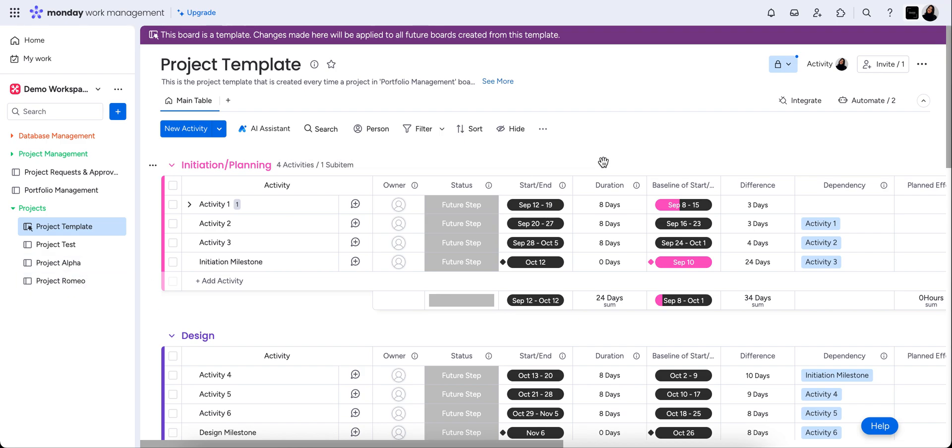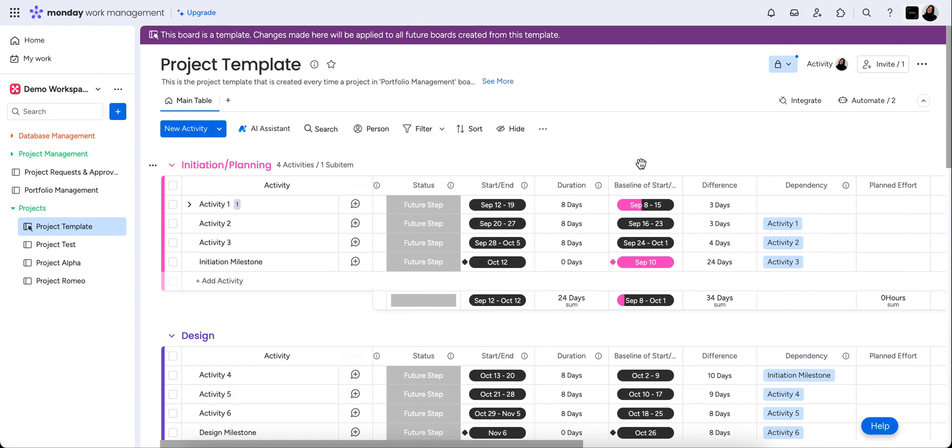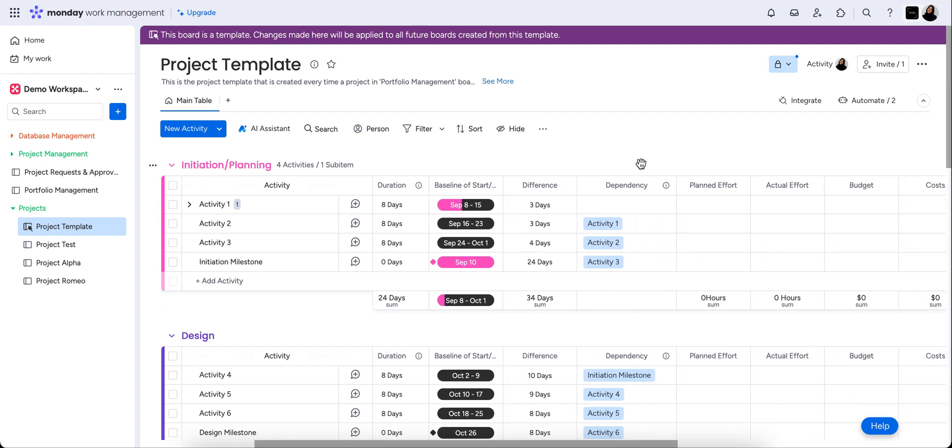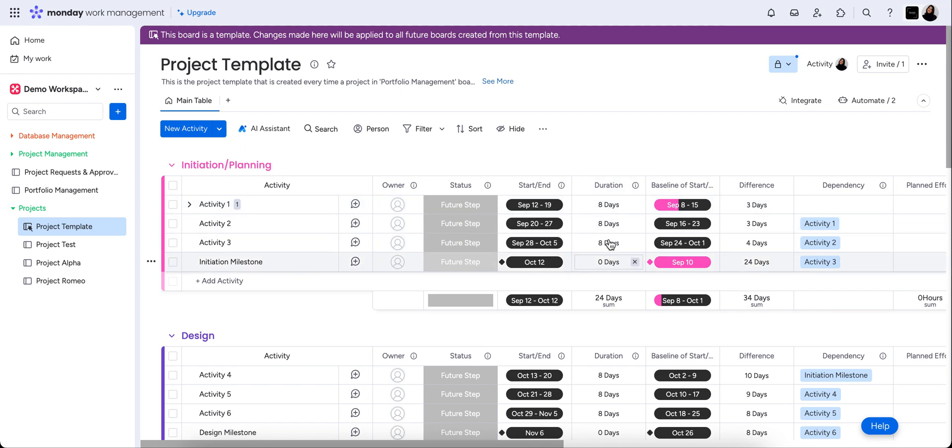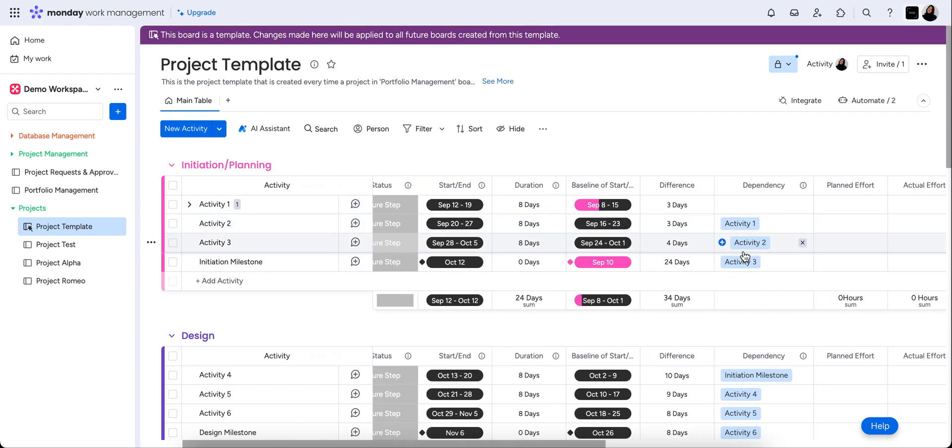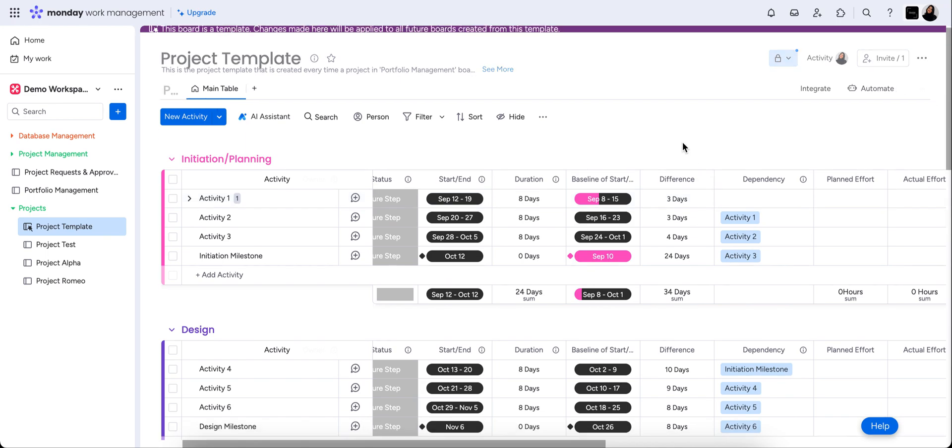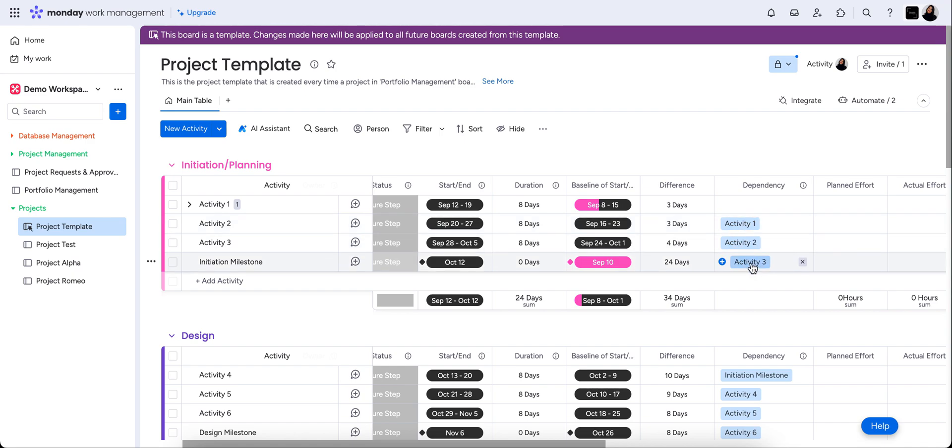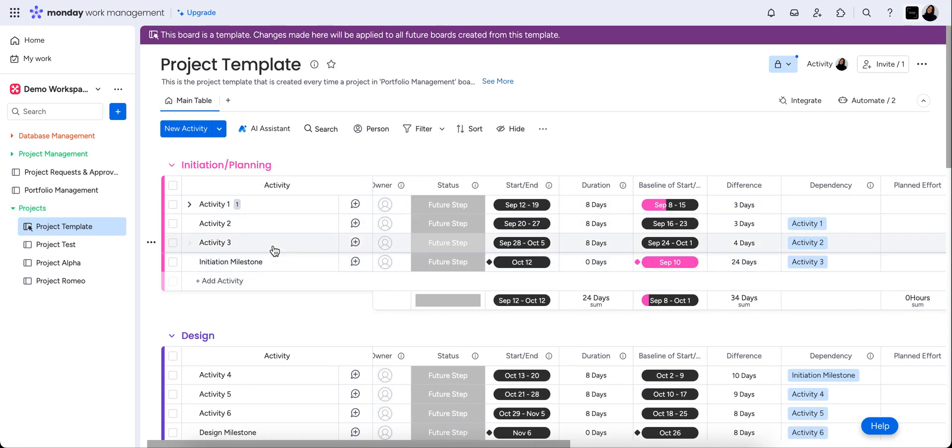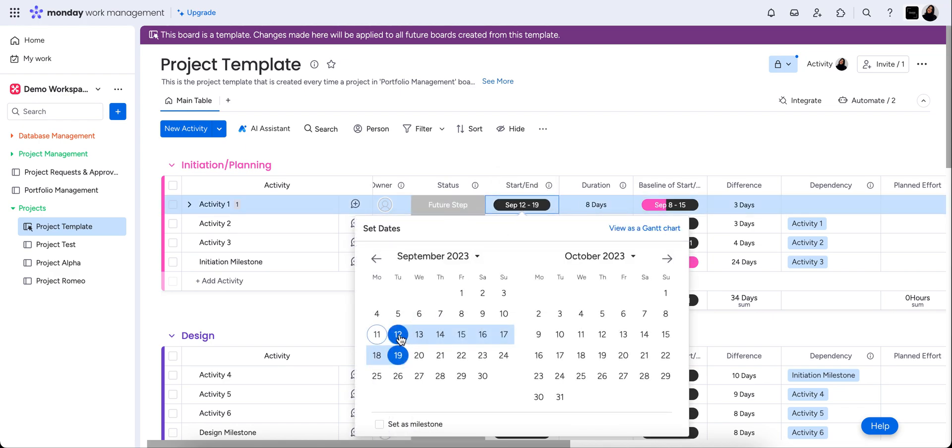Now, this template here is really awesome in that it shows you the capability of these boards. Now we have set this template up specifically that it's going to capture the start and end date, the duration in days which is automatically calculated, the baseline of where we thought we were going to start and end, and then the difference in days. You can see also here that we've set up the dependencies. So we've already have this set up that your first task has to be completed before the second task can commence and so on and so forth.